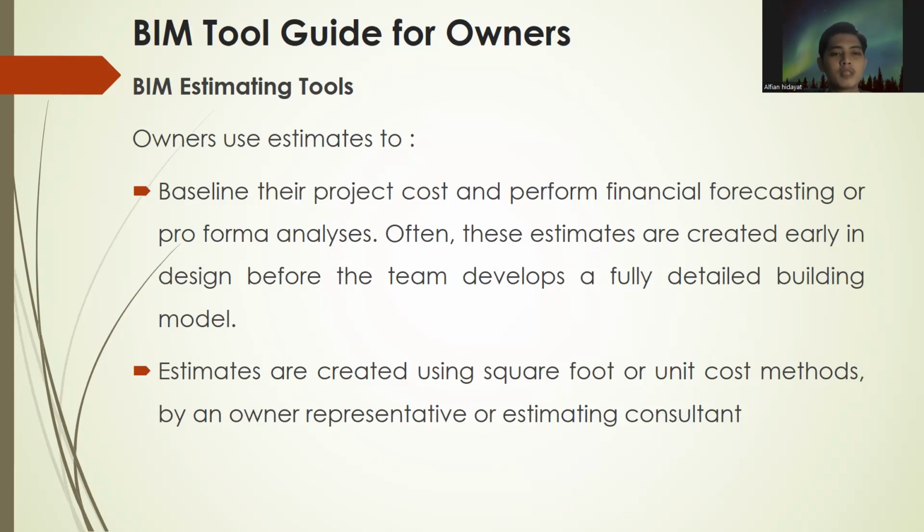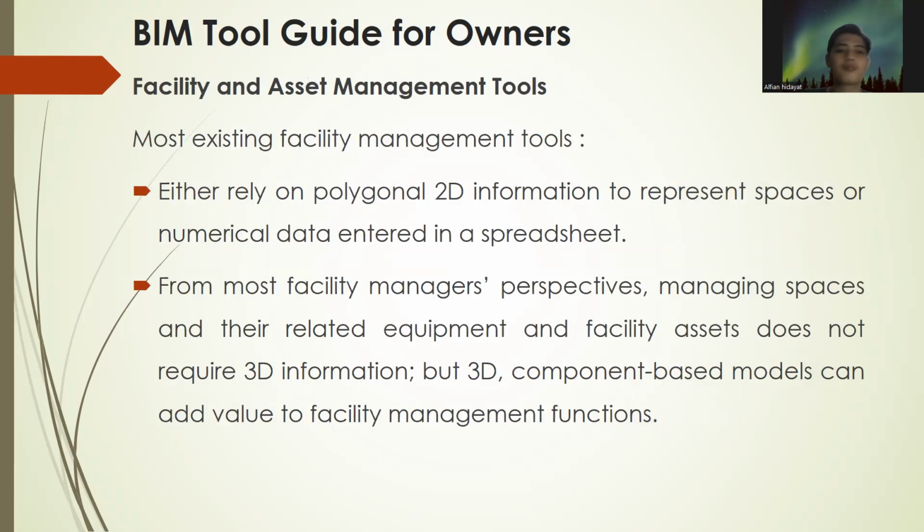So this is a BIM estimating tool. Owners use estimators to baseline their project cost and perform financial forecasting or pro forma analysis. Often these estimates are created early in design, before the team develops a fully detailed building model. Estimates are created using square foot or unit cost methods. This is the estimated cost in a BIM, used by an owner representative or estimating consultant.